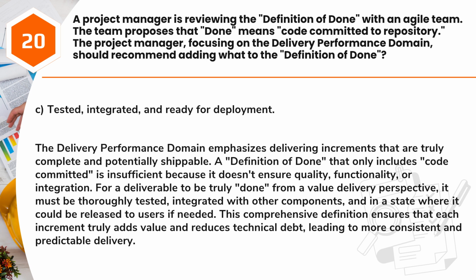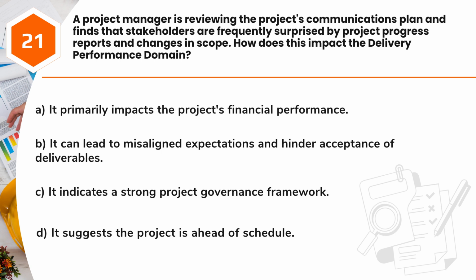For a deliverable to be truly done from a value delivery perspective, it must be thoroughly tested, integrated with other components, and in a state where it could be released to users if needed. This comprehensive definition ensures that each increment truly adds value and reduces technical debt, leading to more consistent and predictable delivery. Question 21. A project manager is reviewing a project's communications plan and finds that stakeholders are frequently surprised by